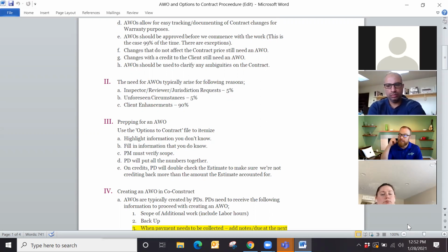It required so much extra demo and hauling of that material and then patching that it took a couple extra days to do all that work to tie the sewer line together. Right. But we did not do an additional work order for that example, because that just wasn't identified on site when we were doing the work as an unforeseen, but it should have been.